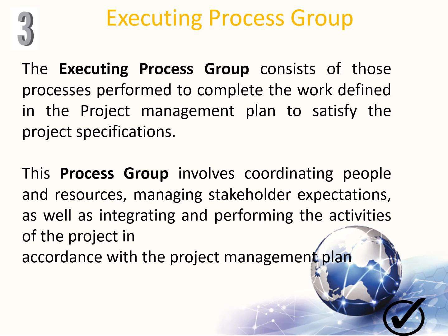Such variances may affect the project management plan or project documents and may require detailed analysis and development of appropriate project management processes and responses. The result of the analysis can trigger change requests that, if approved, may modify the project management plan or other project documents and possibly require establishing new baselines. A large portion of the project budget will be expended in performing the executing process group processes.